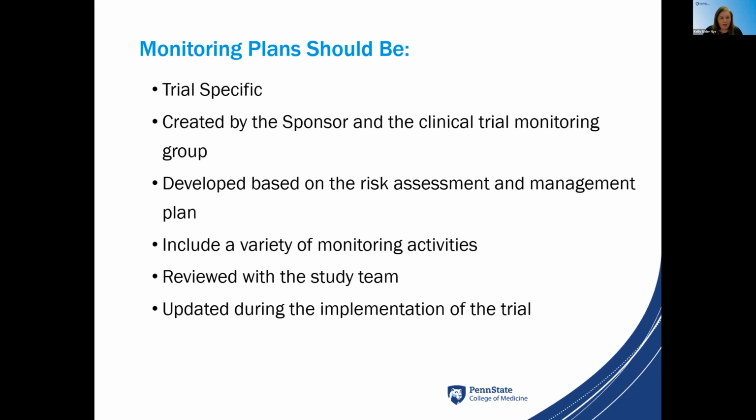So in a wrap up, monitoring plans should be trial specific. It's not a one size fits all. They're created by the sponsor and the clinical trial monitoring group. It should be developed based on a risk assessment and a management plan. Include a variety of monitoring activities. It should be reviewed with the study team so that everyone is aware of the monitoring activities and updated during the implementation of the trial.